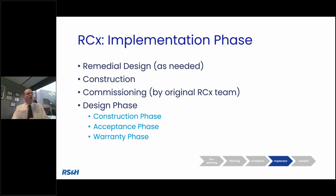And if you don't go back and check, how will you ever know, other than over time you notice, wow, I was getting a 5% utility savings in year 1 through 4, but I'm on year 5 and now I'm starting to slowly tick up. What's going on? What's changed? So having these commissioning and retro commissioning activities down the road will, again, be that insurance that what you've done is sticking.